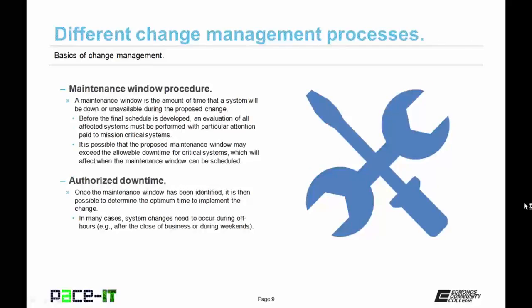When planning out a change to an IT system, it's important to involve a maintenance window procedure. A maintenance window is the amount of time that a system will be down or unavailable during the proposed change. Before the final schedule is developed, an evaluation of all affected systems must be performed with particular attention paid to mission-critical systems. It is possible that the proposed maintenance window may exceed the allowable downtime for critical systems, which will affect when the maintenance window can be scheduled.